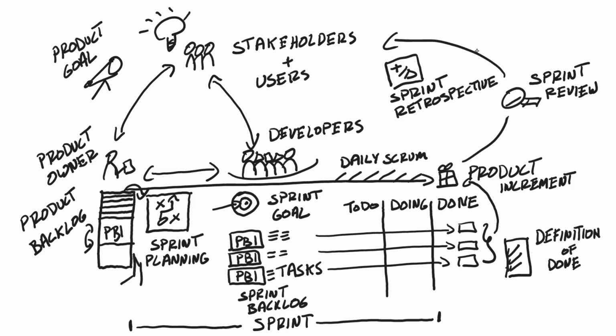Throughout the sprint, the team is actively doing product backlog refinement, where they refine, clarify, research, estimate, split, and prep the product backlog items so that the items at the top of the product backlog are ready to be worked on. There are no breaks between sprints. When one sprint ends, the next one starts. So the product backlog needs to be always prepped with actionable items for future sprints.